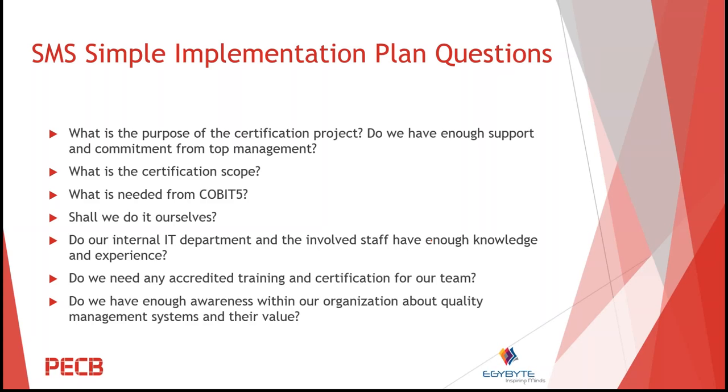Because believe me, I have done a lot of trainings and a lot of consultations, and the first thing I ask about is, do we have top management commitment? And if I don't have it, I don't start the project. Because top management commitment makes me sure that the project will continue, at least to its end. It can be a success or a failure, but I need to complete it to the end.